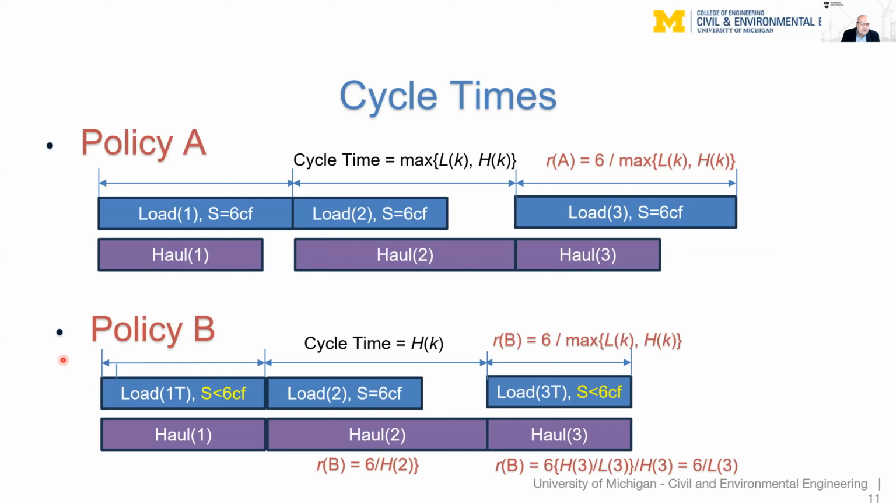So to get to the bars for policy B, we have exactly the same bars for the whole activities. They're copied down here, but they start one after the other without ever waiting for anything to finish. And the load activity has truncated durations. That's why there is a letter T here.